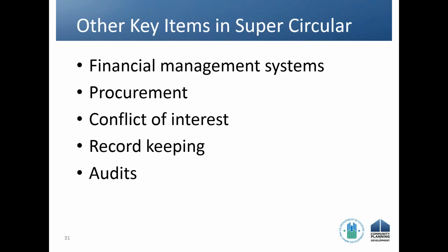If you are a state, you actually have an option. You can either choose to follow Part 200 or you're allowed to follow state procurement law. Most state procurement law is actually much more stringent than Part 200, but you'll have to document compliance with following those rules. There are also for CDBG-DR some transparency requirements around procurement. And again, you'll have to look at your Federal Register notice about your particular appropriations to know what they are. But in most of the recent ones, there have been requirements around posting RFPs, posting the winning bidder, the information on the winning bidder, and other similar sort of things so that the public knows the procurements that you've done.